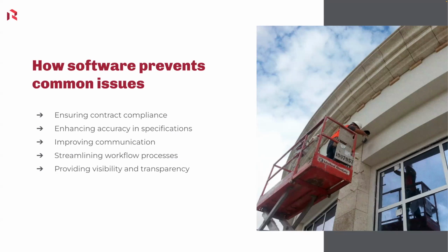But thinking of how the stuff comes through now and how we've rebuilt our workflow and our internal processes, say when the subcontractor pay-up comes in, and going back to bullet point 1, the contract compliance, before it goes through approvals, we're making sure the lien release is there, the correct insurance is there, and it's built into that system.